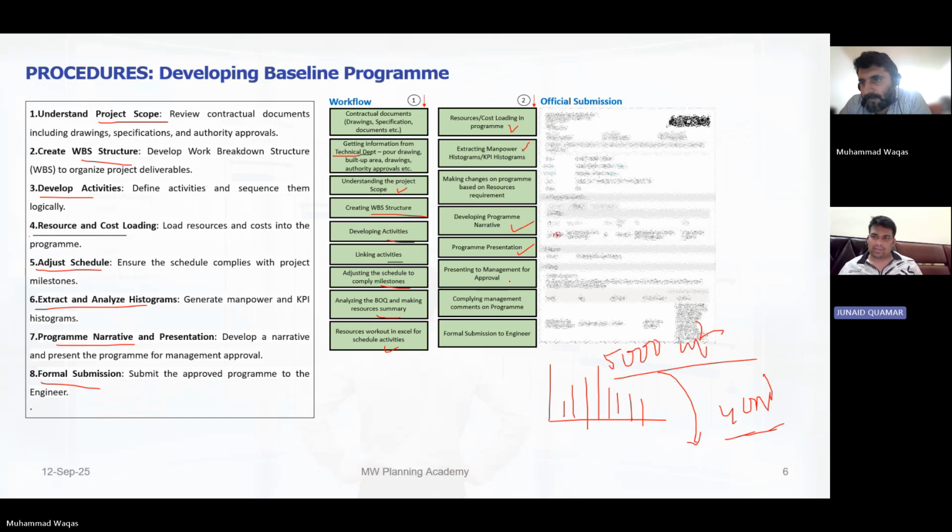We have to speak with the site execution team to get validation of the duration for the kind of activity that we are feeding the data. Exactly. It's taking input from them, because during execution they cannot deny that, look, I have given you the resources as you said. You said that you need, and that should also be logical. They cannot abruptly say that for 1 day of activity they will require 7 days. So our presence of mind will also be required, and we also have to re-verify the critical activities.